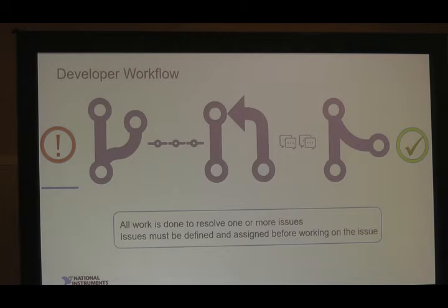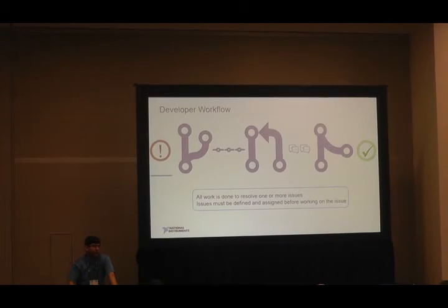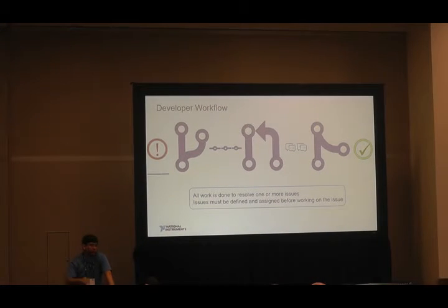GitHub has an interface that they just released 2 months ago, which is actually pretty nice, where it lets you manage all the open issues that are present in an entire organization. And you can basically choose, Kanban board style, which ones are going to go into your sprints. We go through and look at all the issues that we've got, and we decide, yeah, we need to do that this time. Move them over to do, and then we pick them off as we go, and we have time as individual developers. We look at that list and pick whatever interests us, with the understanding that we need to get through the whole list by the end.